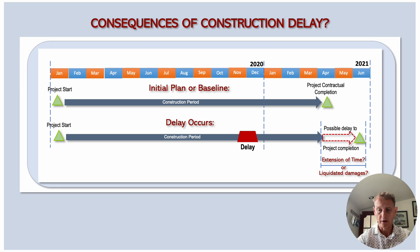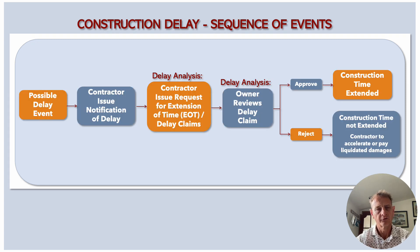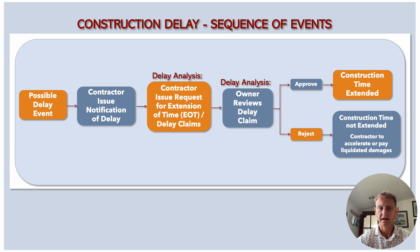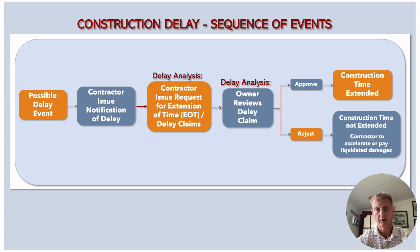So let's see how this process normally unfolds. Firstly, the contractor would become aware of a certain event that might delay completion. Most contracts would require the contractor to issue a formal notification of delay. This notification can take various forms — it can be an email or a written document, and the contract would normally give guidance. This document would go to the owner, enabling the owner to take certain action from their side to assist in reducing the impact of the delay.